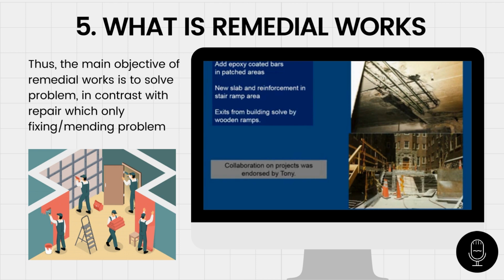Here is a new ramp for the stairs. An interesting feature, perhaps I can point this out a little bit, is the way that we provided access to the building. We would remove this ramp and roll it on rollers and roll it back in place, so people could get in and out of the building. This was a restructuring idea from Tony Murray.